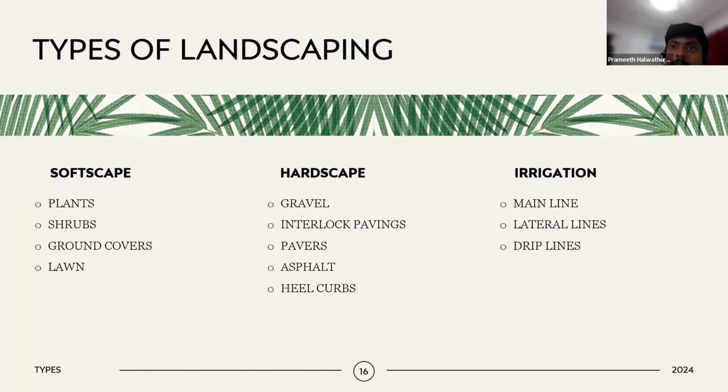We have some pavings. We can use some interlock pavings. But you know that we can see only the gravel, only the interlock pavings. Inside, we have the subbase and the excavation. We can use some other soil. Everything is included. Not only the visible items; we have to move inside of the pavings and inside of the gravel. We have to think of every item. We cannot miss anything.